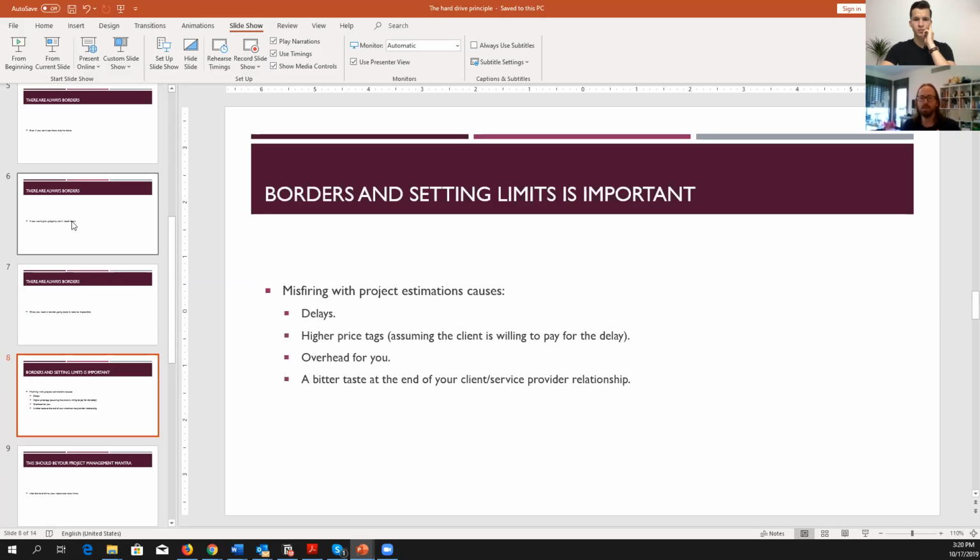The only way you are going to get that money back is by talking to the client. Listen, this delay, caused by either you or me or a third party, is costing me an X amount of money. What can we do? And you will find out that the more satisfied the client is with the way you are managing him, putting the borders and including him in the process, the more willing he is to pay for delays or for misfires in estimation, especially if he's the reason who caused them.